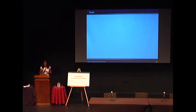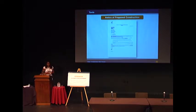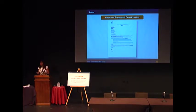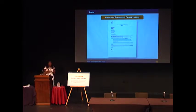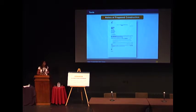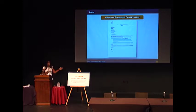Over the past year we've been working to implement some tools to better assist us in communicating with utility companies and going through this avoid, minimize, and accommodate process. One tool I want to point out is the Notice of Proposed Construction. What this template does is provide a consistent means for TxDOT to communicate with utility companies early on in the project — so say at the initial project kickoff meeting, we know what the schematic footprint is going to look like, and we want to start communicating that as soon as possible to say: we have a proposed roadway project, here's where it is, please let us know if you have any facilities along this corridor.